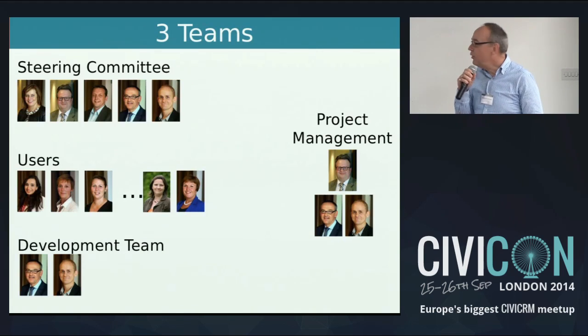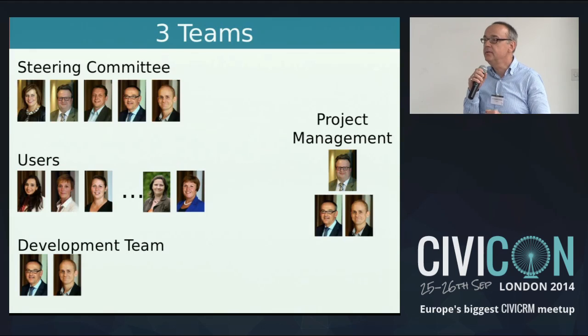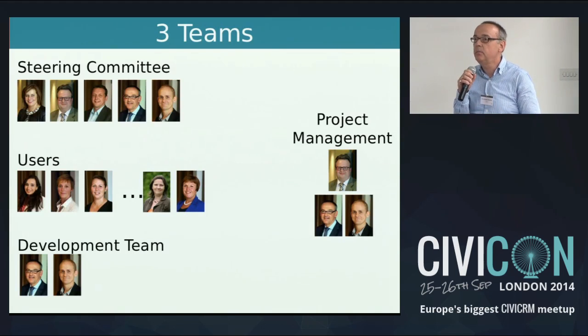The advantage of the choice was that users were just beginning using the system for 2 weeks before going on vacation. And so we had 2 months of time to solve the most critical problems. So when they came back half of August, the system was stabilized and we could work on the minor bugs since then. So there are quite a lot of new features then added. Yes.